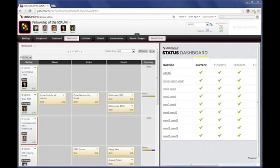You need Agile when you don't know what you're doing, when you're trying something new, and where the value of failing fast essentially overwhelms the resulting slightly higher scrap and rework costs. Now, what I would tell you is I think there's a lot of situations where waterfall is used today where people think they know the domains better than they actually do, and where business experts think they know exactly what needs to be done, but they don't. And so it's from that mismatch that we get things like healthcare.gov, where hundreds of millions were spent in what is most certainly a waterfall-based process, and they weren't really able to learn from mistakes early on.